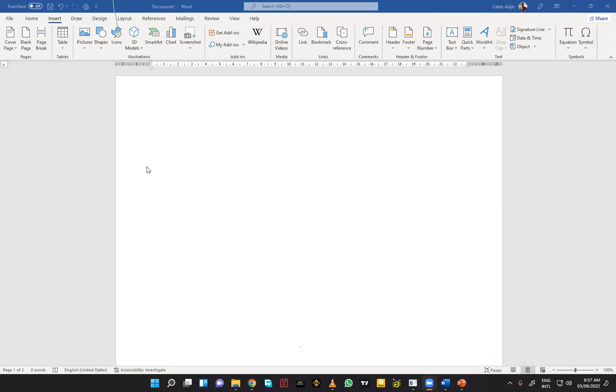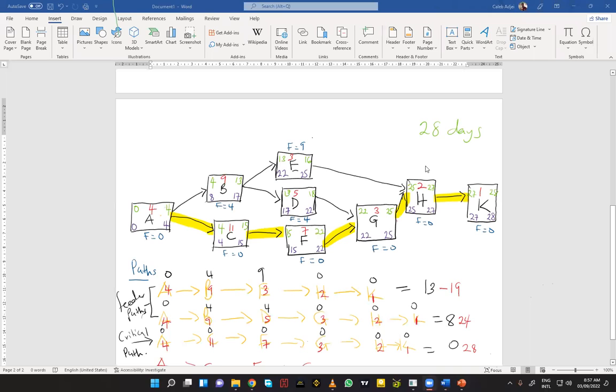What I'm saying is, can we also derive the critical path by saying the activities with the same early finish and late finish when the days are the same? Those are the activities with zero floats. You see, all those with the zero float have the same early start, early finish, late start, late finish. And those are the activities on the zero float. So those are the ones that usually end up being on the critical path. I hope you're with me. Yeah. All right. Okay. Thank you.